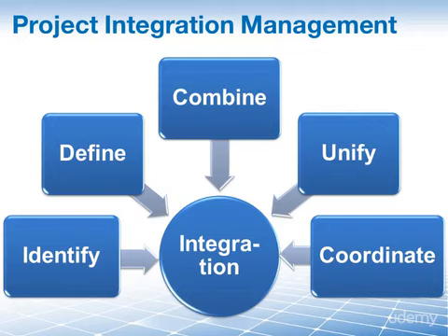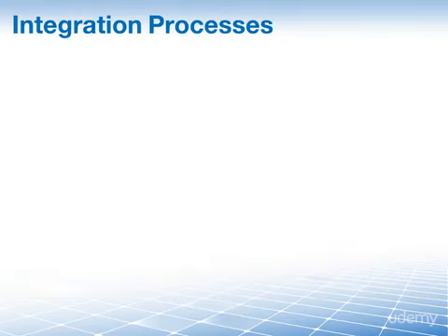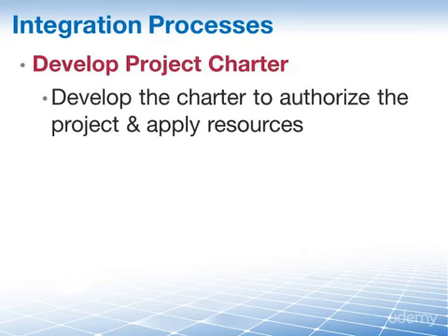Understanding integration management is not difficult. The processes are easily understood and brought into relation with the rest of the PMBOK guide and your project. It is much more difficult to actually execute them during a project. And here are the 6 processes of project integration management. It all begins with develop project charter, which is the process of developing a document that formally authorizes the existence of a project and provides the project manager with the authority to apply organizational resources to project activities.